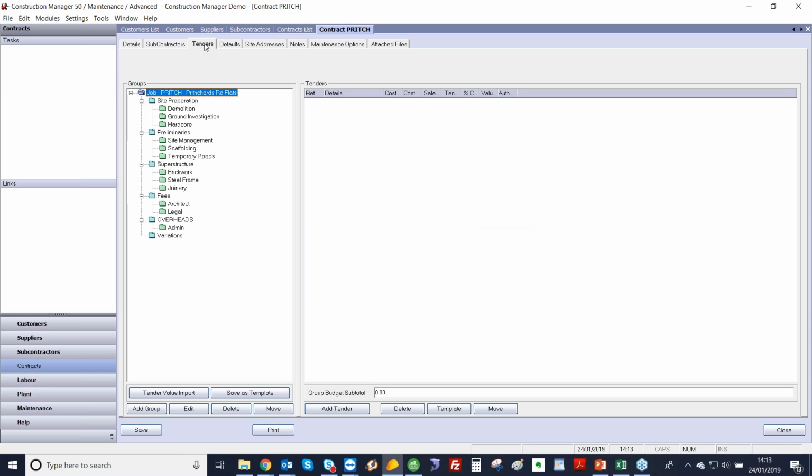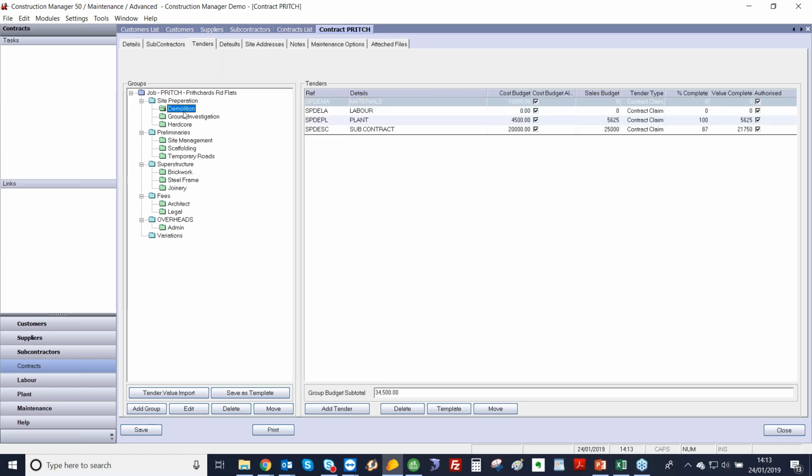The second one is what's called cost codes. So they're any code that you want to track the cost of, i.e. labour, material, subcontract labour, subcontract material, plant hire, overheads, delivery charges, etc. On the screen at the moment, we've got what's called tender codes. So on here, this one's been set up as a house builder, but this structure will be created specifically for your needs.